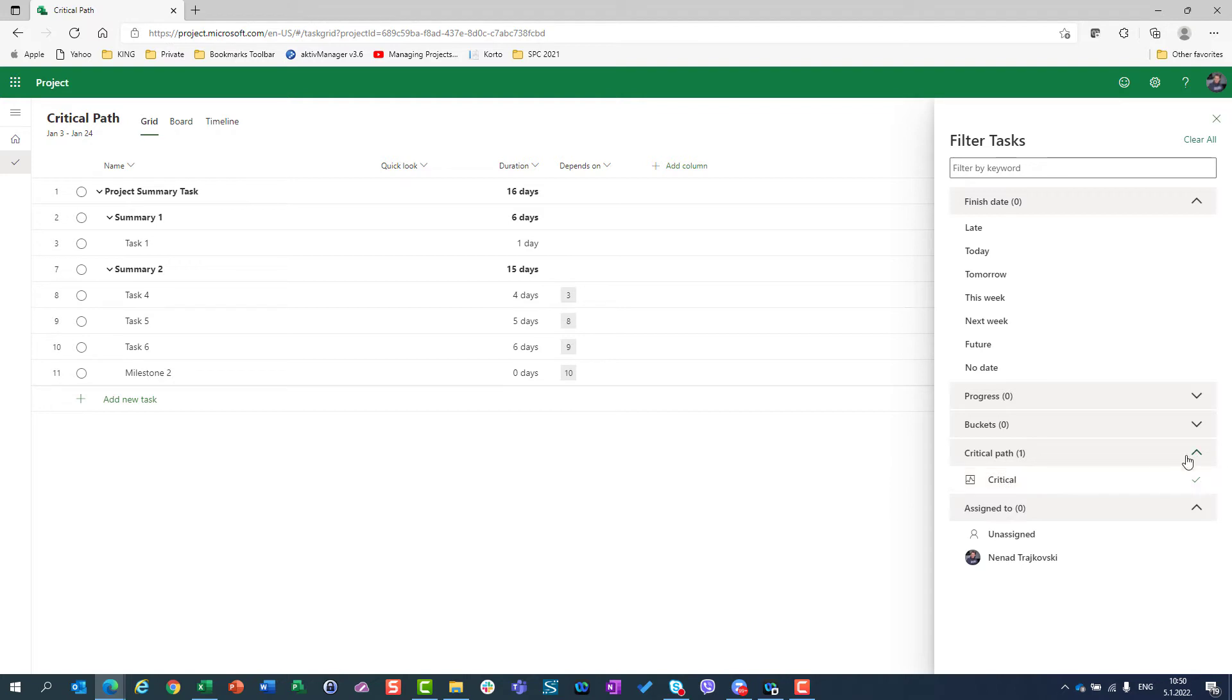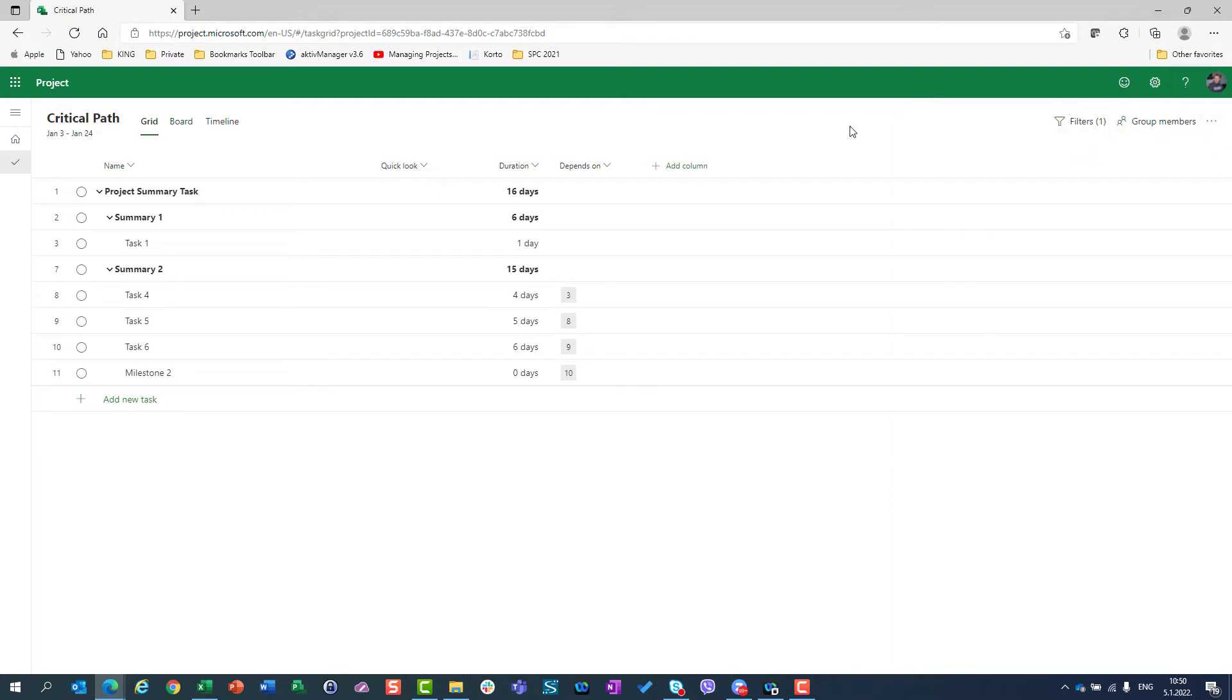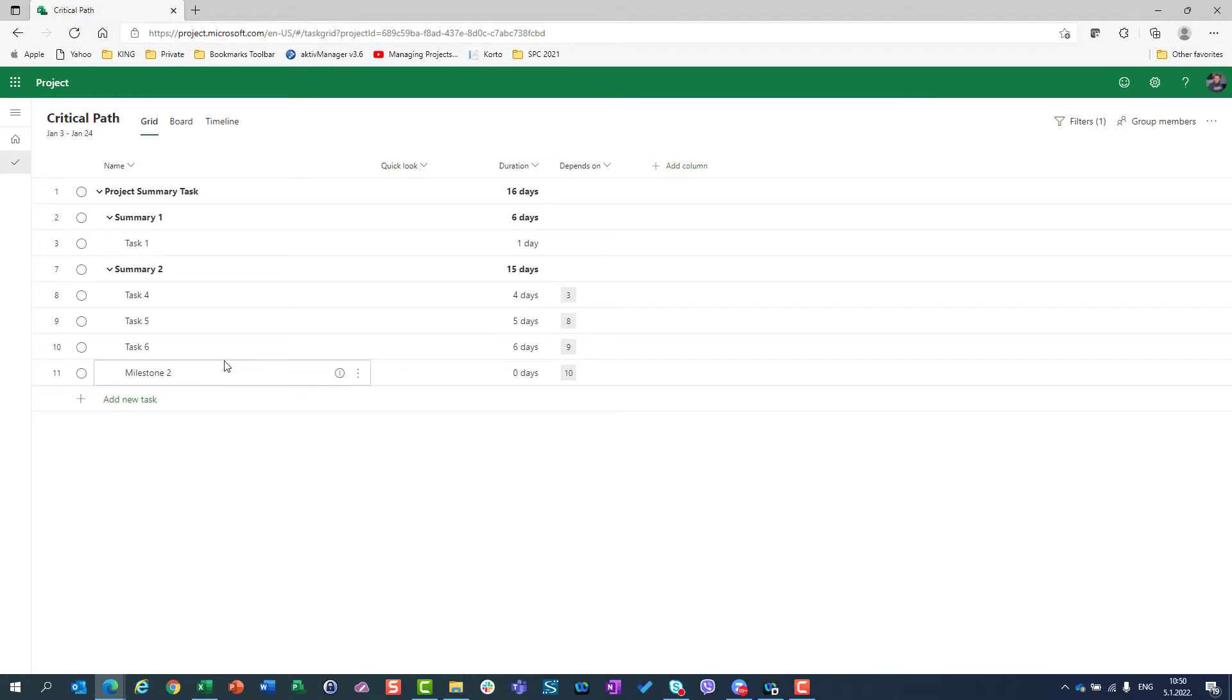If I choose Critical and I turn that off, I will have only tasks which are on Critical Path shown in this Grid screen.